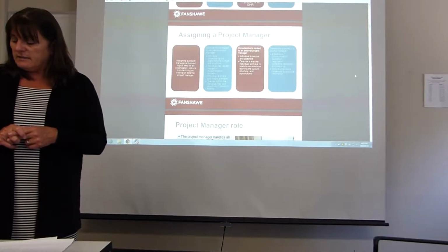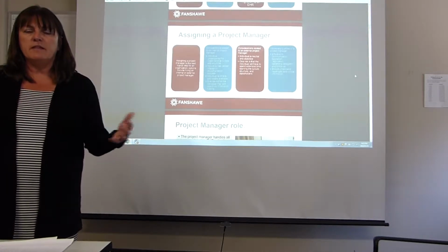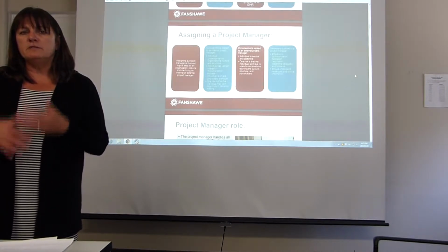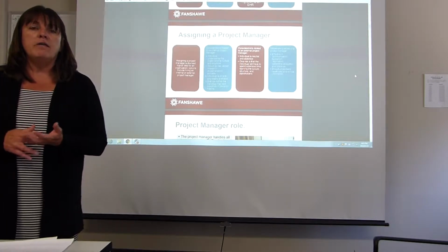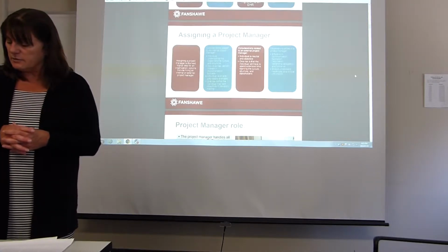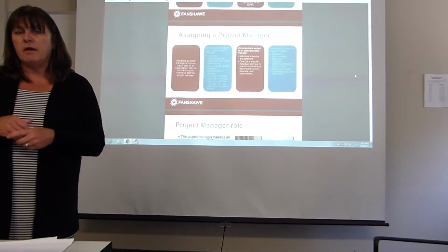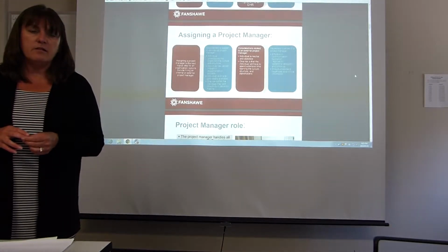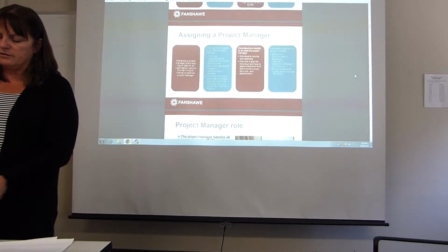They also need to delegate and to ensure that there's always constant follow-up on tasks that have been delegated. So if a task has been delegated to a project team member, there must be a vehicle for the project manager to either receive a report back on the status of the delegated tasks, or perhaps a meeting scheduled. Or perhaps it can also be on the next meeting agenda. It would be a review of the follow-up items. They should understand healthcare and the clinical information and the information that needs to flow to various stakeholders.